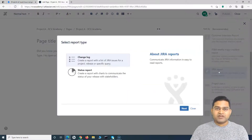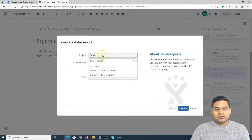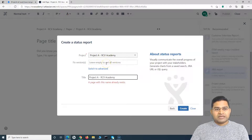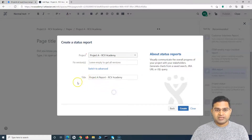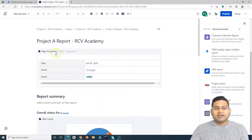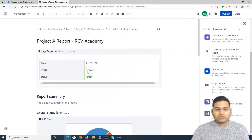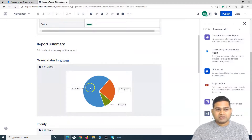Click on the Jira Report template — this is available by default in Confluence. Select the Status Report, click Next, choose the project (Project A), leave the fixed version blank, and provide a title such as 'Project A Report.' Then click Create. Because this is a template, it will automatically create a well-defined, well-structured report page.